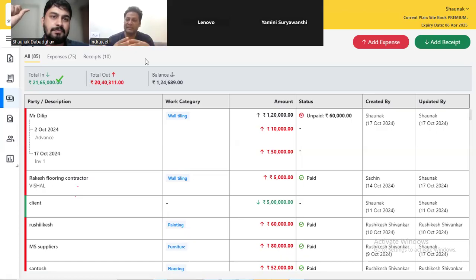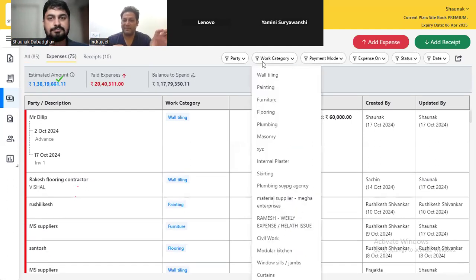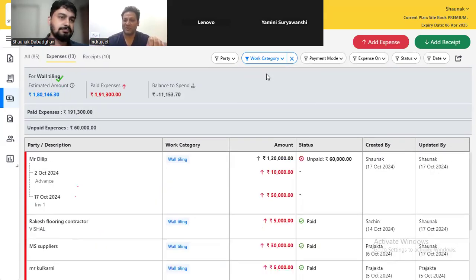The second most important thing is, though you have your estimation in place, you have to track the estimate against your expenses. Otherwise, if you have considered a Jaguar X series tap and then you are buying a Jaguar Y series tap, which is costlier, it is going to kill your profits. So when you are taking turnkey jobs, first thing, the contract or the estimate or the quotation should be very crystal clear, mainly for the finishing materials.